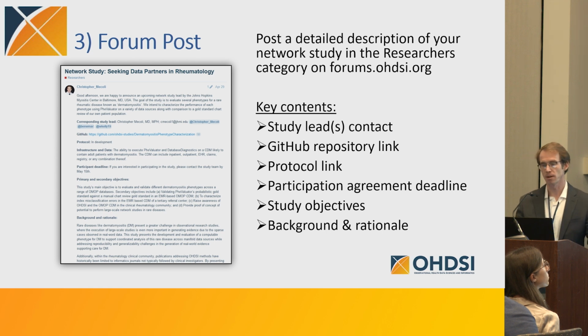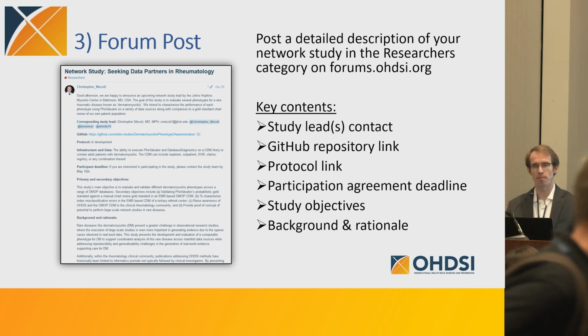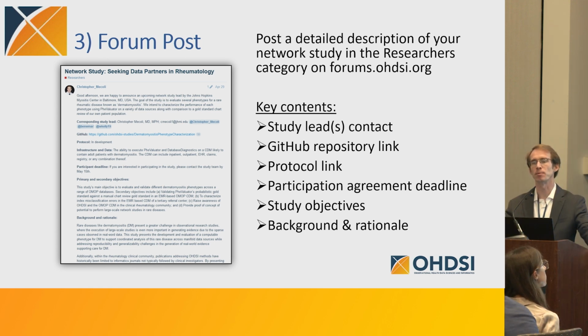Who is the study lead? So contact information for the study lead or leads, a link to your GitHub repository that you've now fleshed out, and a link to your study protocol so people can get more information. A deadline. It's good to set deadlines because with large groups, things move slow. So go ahead and decide on a deadline for people to let you know that they would like to participate in your network study.